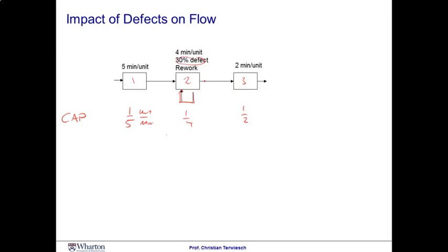However, rather obviously, this analysis misses the effect of rework. Rework can make an activity that previously has been a non-bottleneck step a bottleneck, just because it sucks up extra capacity for the rework loop. So a better analysis goes something like that.